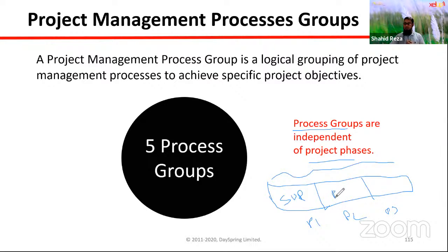In the next phase, they will do the R&D. They will research that primary and secondary data, and they will develop some project or idea on how to remove or alleviate the poverty. So this is the second phase. Third phase, say a pilot project. Out of 60 villages, maybe they will run the pilot project in 5 villages based on their research and development. So that is phase 3. So you see, in one project there are 3 phases. And in phase 1, this is a big phase, right?